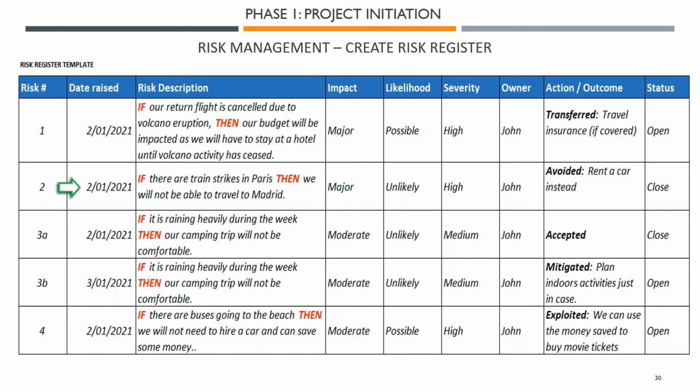So forget about the train. I will rent a car instead. And then you can close that risk. This is not a risk anymore. You don't want to drag this risk along with the project with you, because it's closed. Someone raised it, you've avoided it, so closed, gone.